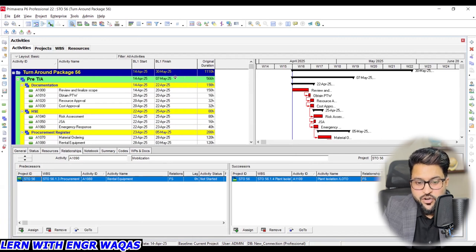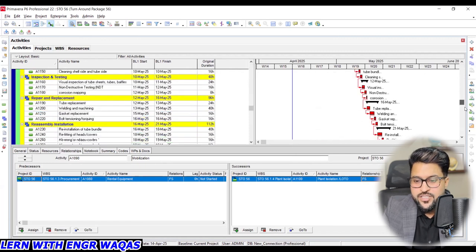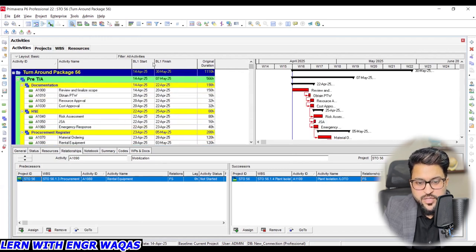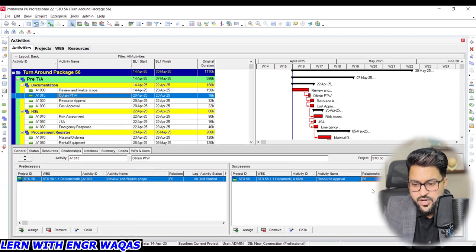It is going beyond. Any date which is going beyond that 25th of May will be declared as critical path. So I need to reverse my few days so that I can find 25th of May over here. So that is something. Crashing technique can come over here. I can make some fast tracking. I can make relationship like start to start. So this can save some days.